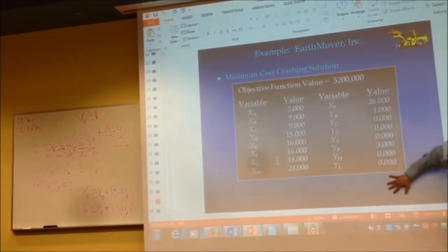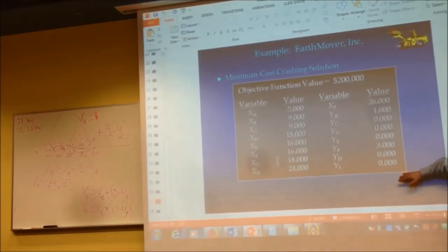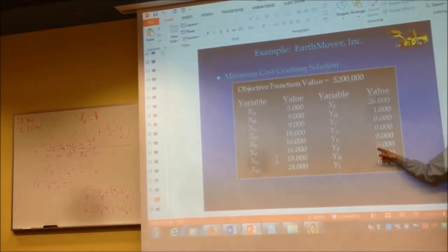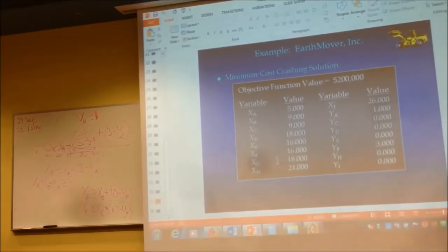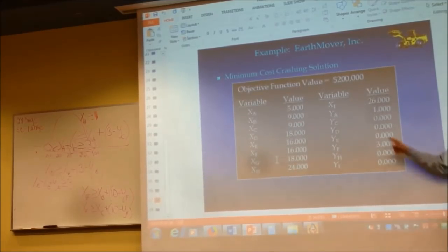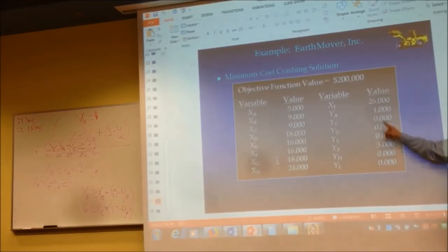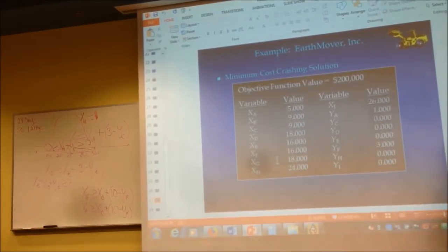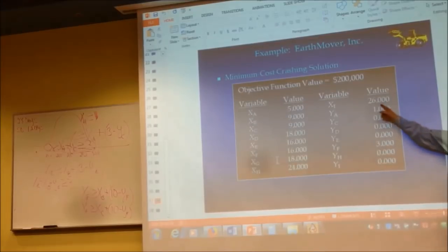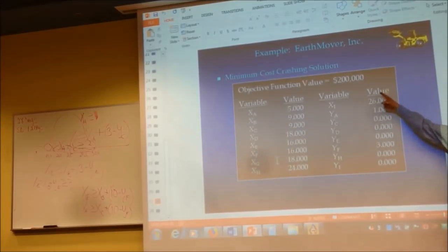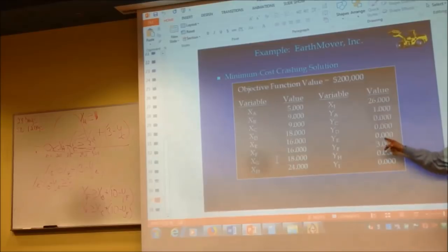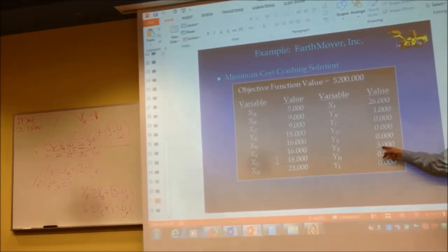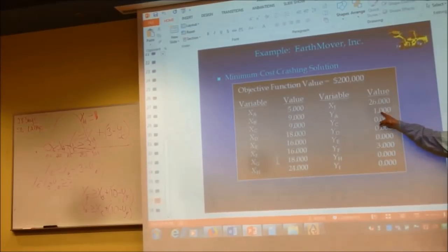These are where you want to look to figure out which activities. If you go back and look at F, and look at what the cost is, we didn't do F, but if you look at the cost and multiply it times 3, you go back and look at A, which we did at 20,000 times 1, so 200 minus 20 means this is 180, so this must have been 60,000. 60,000, 60,000, 60,000 is 180,000, plus 20,000, that's how it got to 200,000.